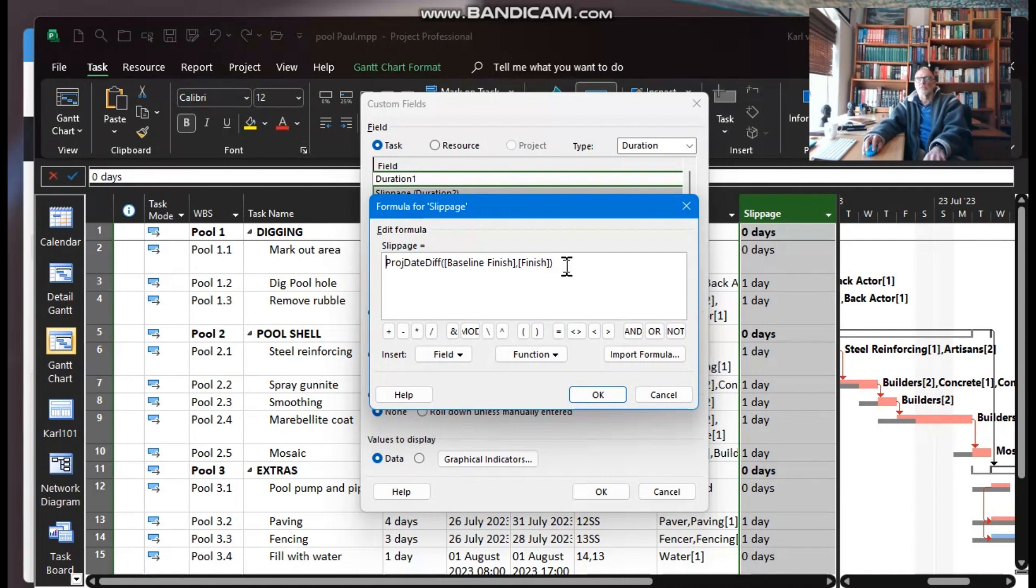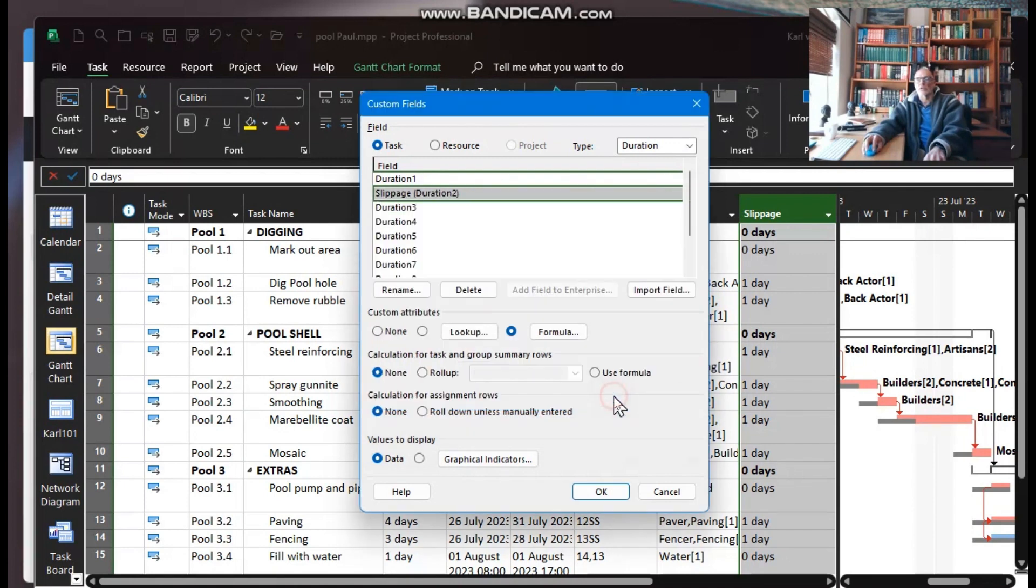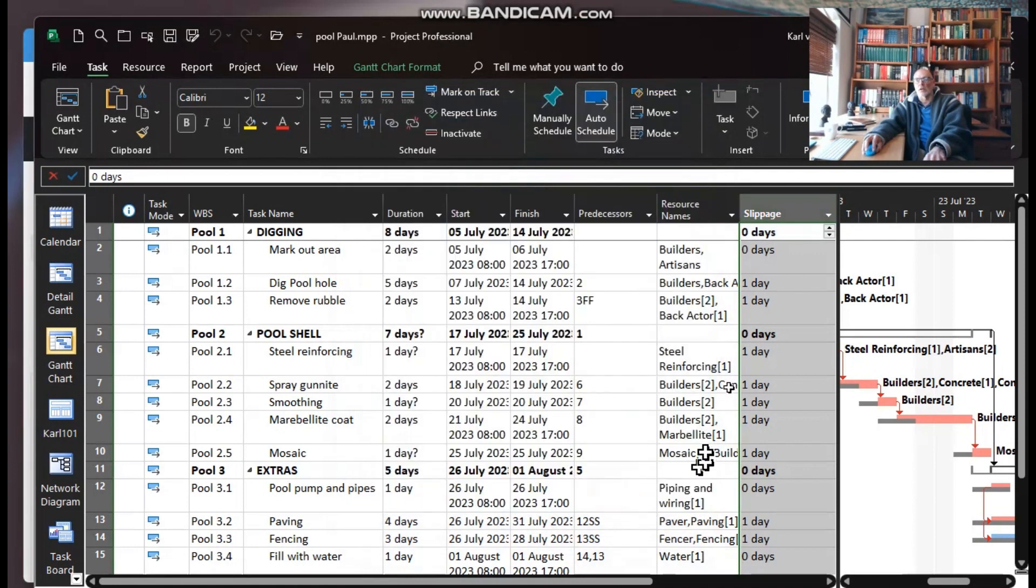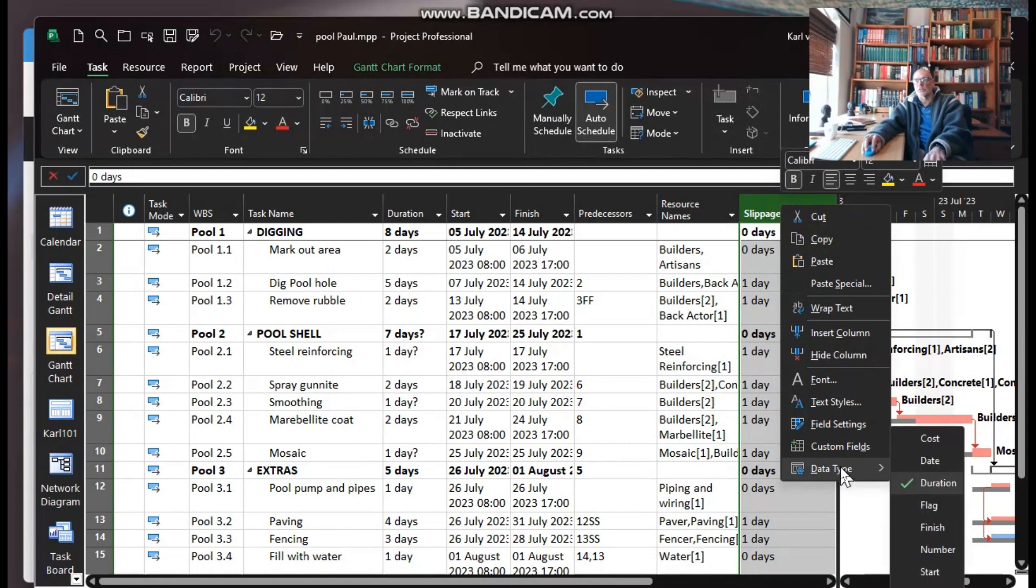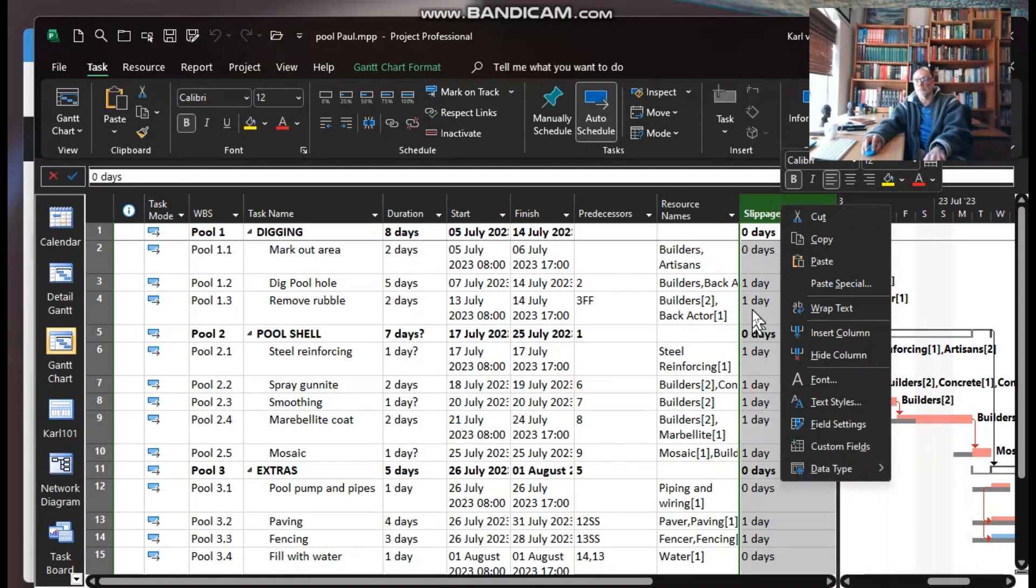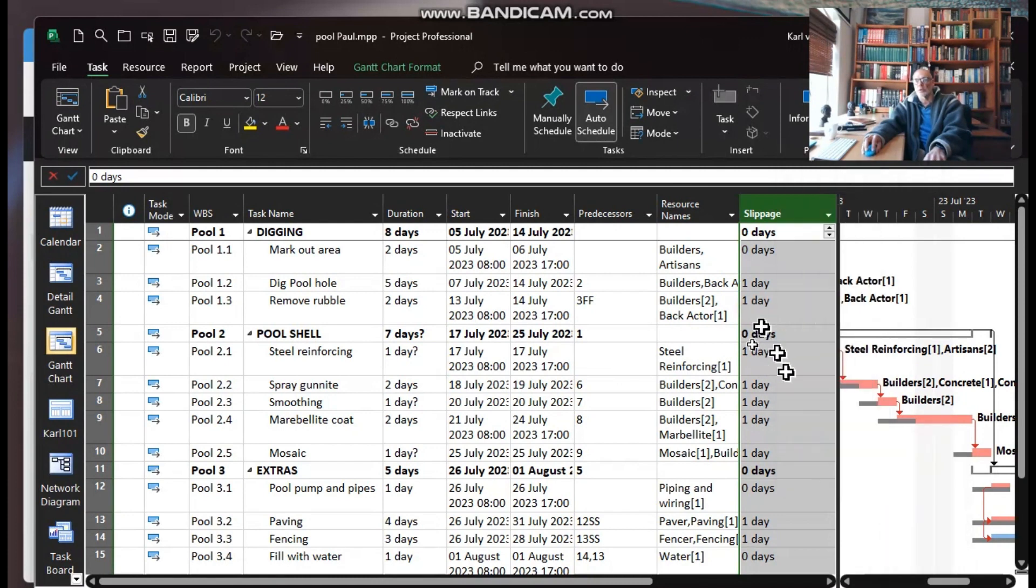Baseline finish - the difference between baseline finish and finish. So that looks good. And then notice here it calculates the day. The data type is, of course, duration. You would need to make sure of that - not cost, date, number, etc. It's duration. So we're calculating our slippage. That's the more accurate way of doing that.